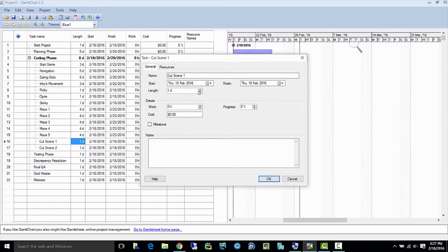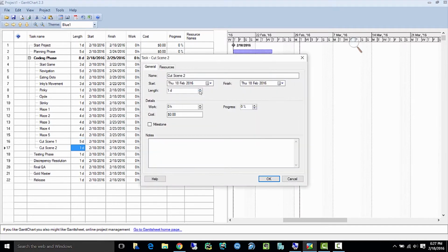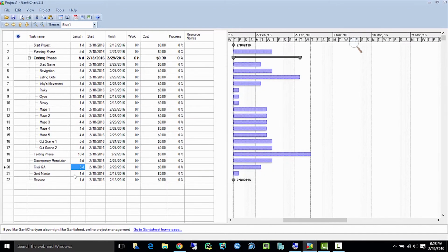Okay, cutscene 1, we'll give that a full 5 days. That's a whole work week. Testing phase, we'll give it a full 10 days. That's 2 weeks. DR, you only get 5 days to fix all your bugs. And final QA should take 3 days at most because you fixed everything. And I'll just leave Gold Master at a day because it doesn't really take a day to burn a disk, right? All right, so now we've got all of these in here.